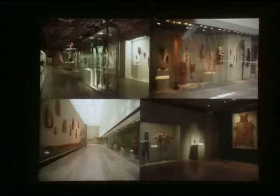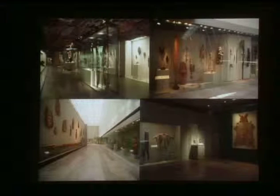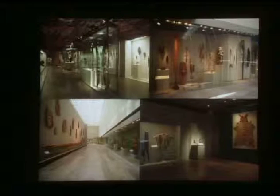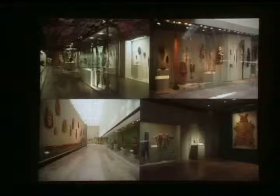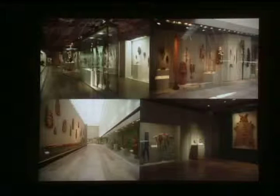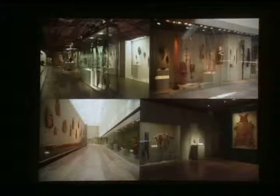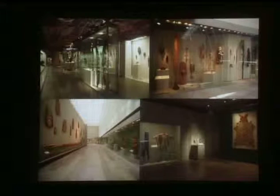The second challenge was the deinstallation of all the art. Of course, that task included the aforementioned 50-foot canoe, along with approximately 1,200 other artworks, both large and small. This part of the process, the planning for the deinstallation and storage, began in late fall 2003, approximately 9 months in advance of the empty space being turned over to the construction team for the installation of the truss. And we do get these schedules, and their contracts are written and money is changing, so we know we have to move according to the plan.